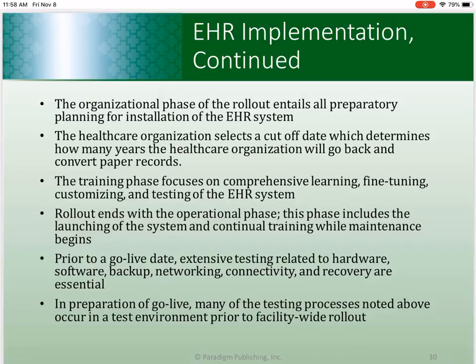And not only would I test the new things that were available once an upgrade happened, I had to go back and test everything. Will a document scan the way it did before? Can I easily name my documents in the quality control process? Can I view my documents? Can I scan my documents? Can I fax my documents? Can I print my documents? All of the things that happen in that system on a daily basis, you have to go back and test all of that over and over again.